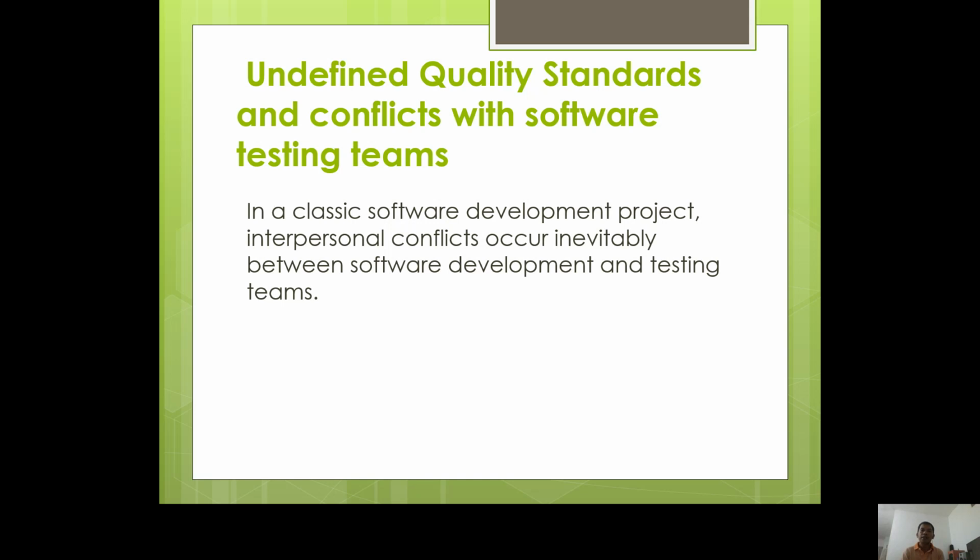Defect identification is inevitable during functionality testing, even if the product has been through unit testing during the development phase. When you come out with a test approach, scenarios, conditions, cases, and scripts, make sure your test plan covers all requirements that are to be delivered by planning several cycles of testing.